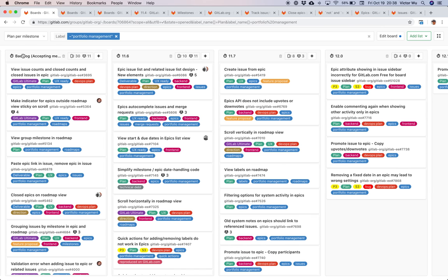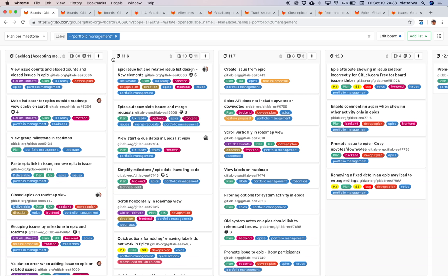There's also a list called the backlog — these are all issues not slotted into a milestone. We use a GitLab milestone named 'backlog' with no dates for this. This is also how you do backlog grooming: you can move issues up or down in the list, and once you move something it saves to the system representing your ordering and priority. This borrows from the physical agile board concept where people moved stickies on whiteboards to represent priority.